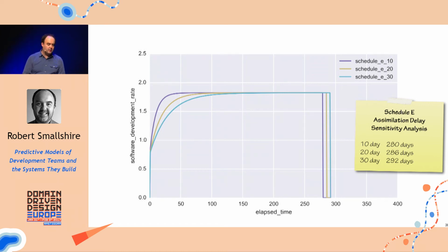If we had time, I would go through how you do sensitivity analysis on all the other things, but I just want to convey the idea of doing a sensitivity analysis on the numbers that you plug into the model, so you can figure out where to invest your effort in determining which ones are really important in controlling the output. Of course, if you discover that some aspects of the model basically have no effect, what should you do? You should take them out of the model and have a simpler model.